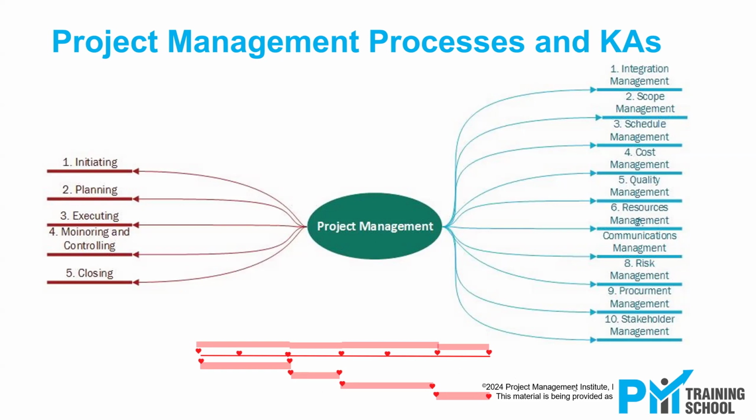Basically, the story starts with a straight line. What's a schedule? A schedule is kind of a complete flow, where the phases you have created will be opened up. Every activity will be shown in a schedule in the shape of a Gantt chart. So when you are doing the initial planning, you are trying to understand the project. You must create a timeline, and that is when you actually come up with the phases. In this hypothetical project, we have created four phases. But the next question is, how many phases could be there in a project?